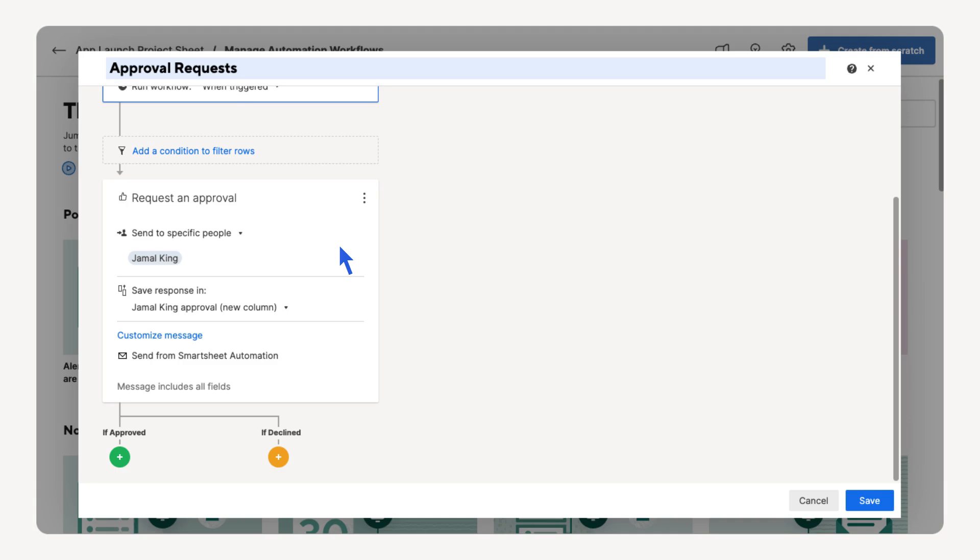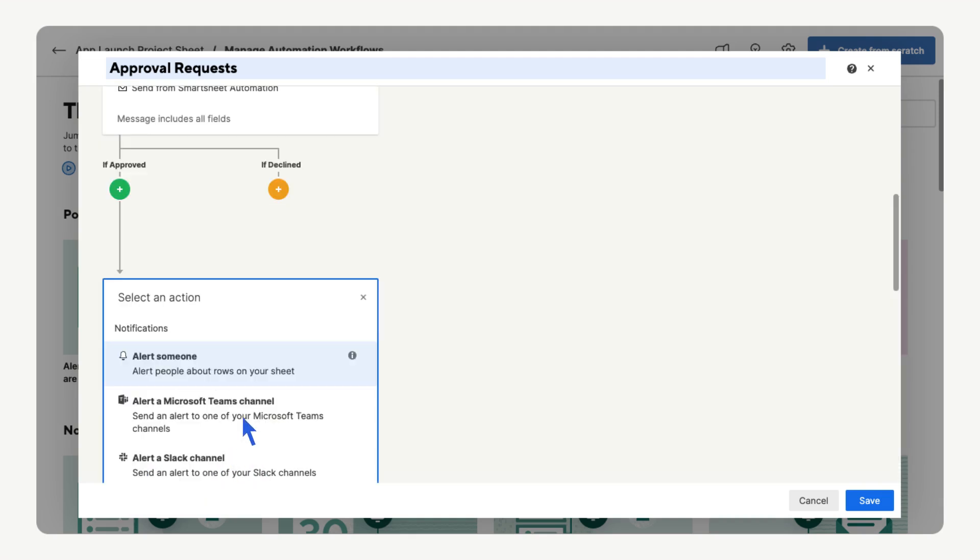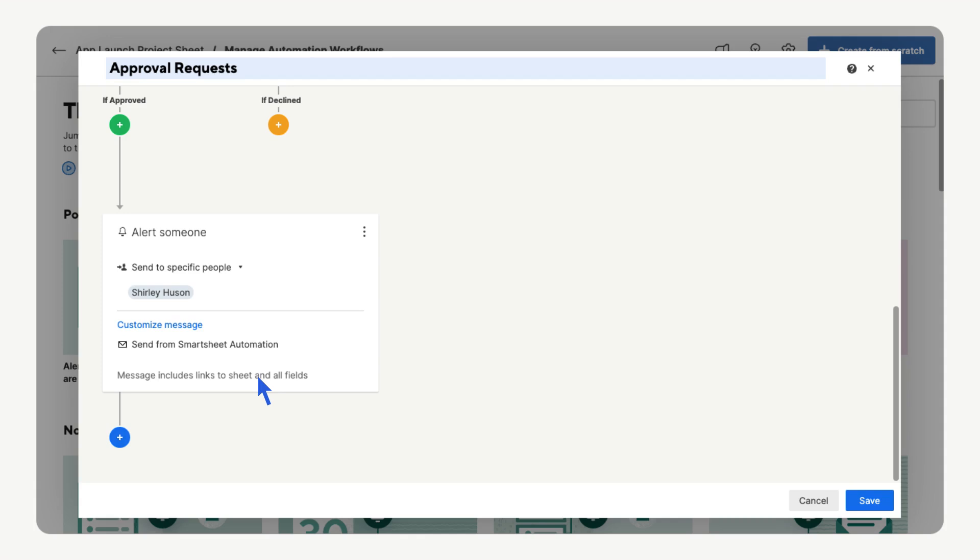If the request is approved, we want the project manager to be notified so they can adjust the project plan accordingly. Select Add an Action, select Alert Someone, add the project manager's email. Then you can customize the message if you need.